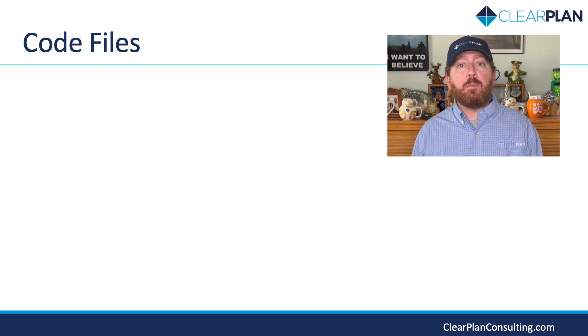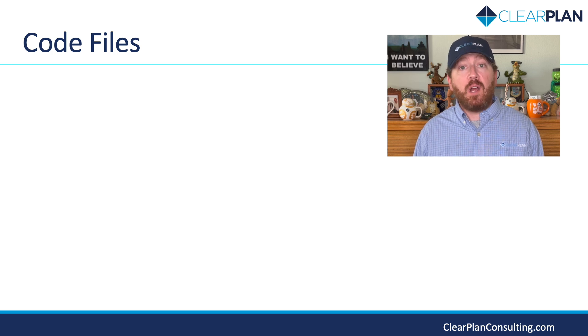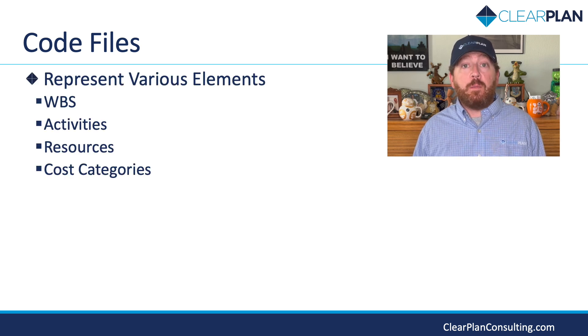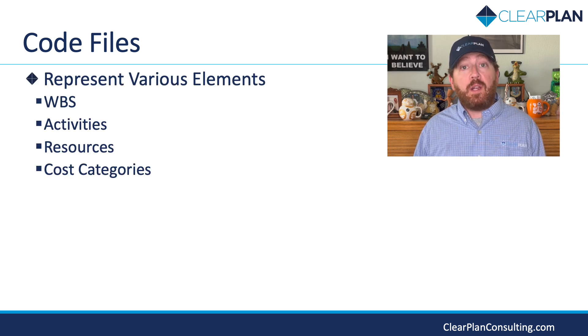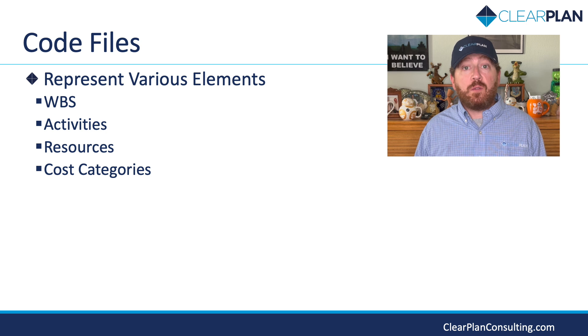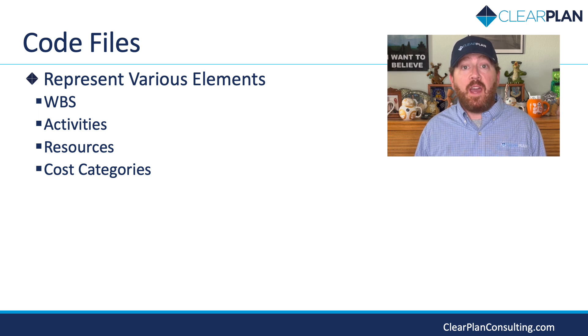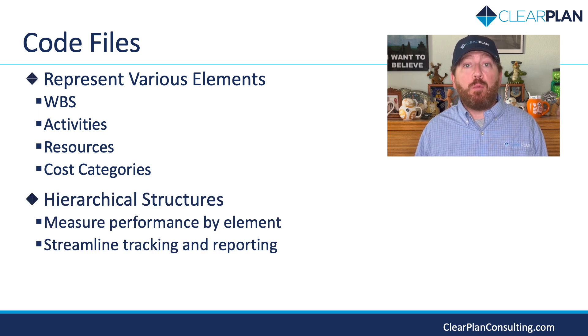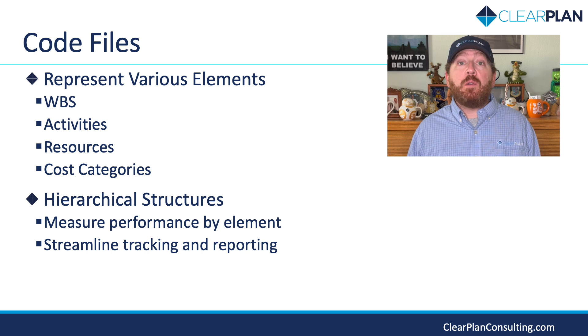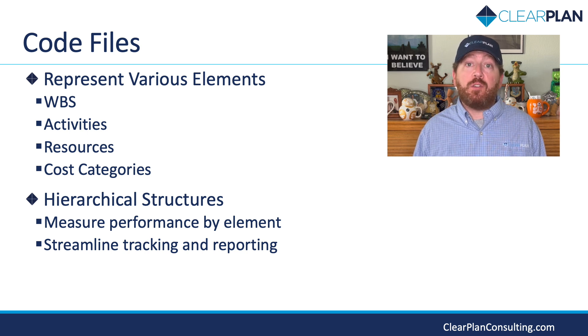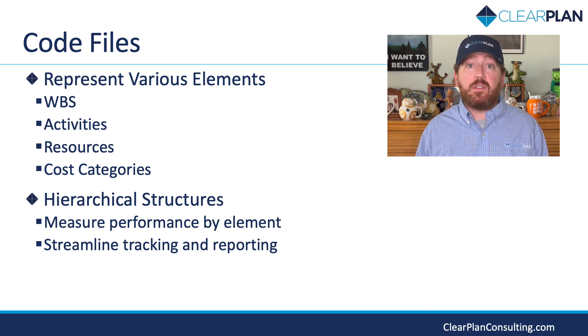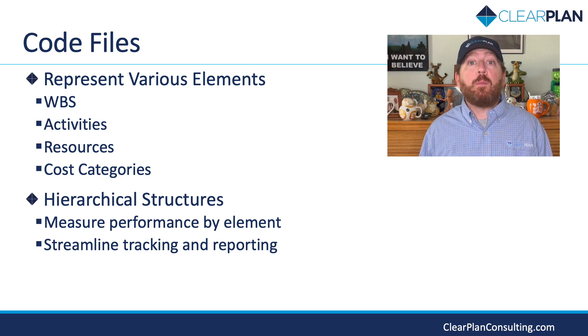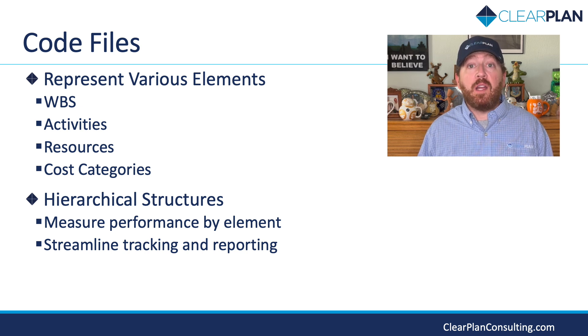In the realm of Deltek Cobra, code files serve as the building blocks of a project. These codes represent various elements, such as work breakdown structure, activities, resources, and cost categories. Code files help establish a hierarchical structure for your projects, allowing you to efficiently measure project elements and their associated costs. With a well-organized coding system, tracking and reporting become more streamlined, enabling a clearer understanding of project progress.